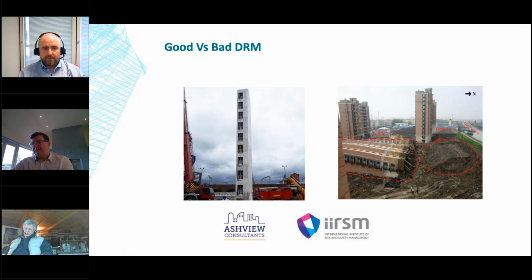So this core will go up, and then there'll most likely be a steel contractor that will come in and tie his frame around that. So it's that whole coordination to site, and the coordination between the design at the early stage, because there may be loadings coming off some of these stair and lift cores and so on. So the coordination at that stage is very important.